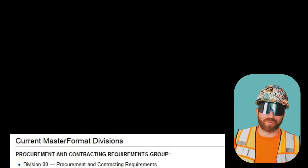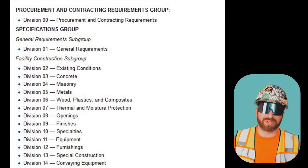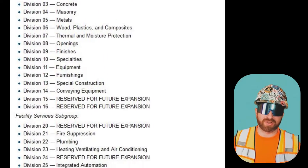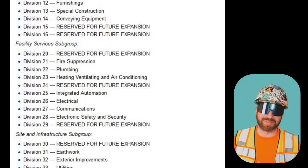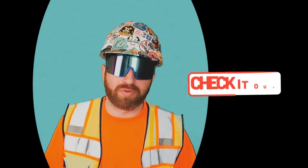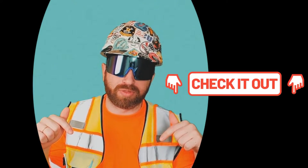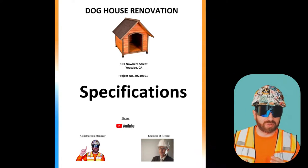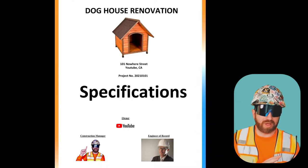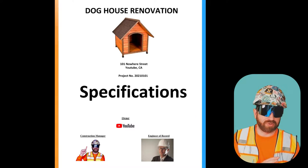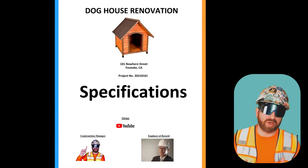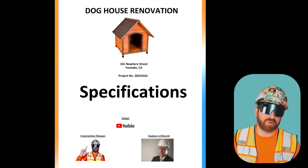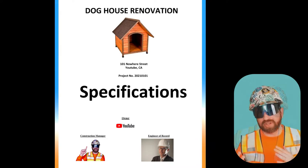The CSI master format is broken up by division numbers and their corresponding scope descriptions. I'll drop more information in the video description below with each of these division numbers and names. But remember, not every project is the same, so one project may have certain division numbers that another does not, and those specs within those divisions may change based on the requirements of that project.